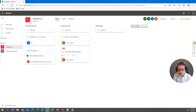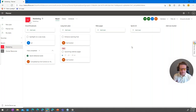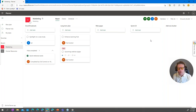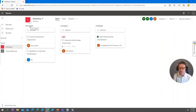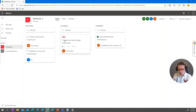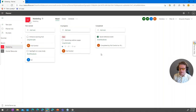Notice tasks are assigned to people and it keeps track of what's completed. You can use buckets for sprints if you're a scrum team — for example, 'Sprint 22' — and drag tasks in during sprint planning. When you're actually working, I'd suggest switching from the 'group by bucket' view to the 'group by progress' view. Now instead of buckets you see: Not Started, In Progress, and Completed. One key agile principle is to keep as few things in progress as possible.